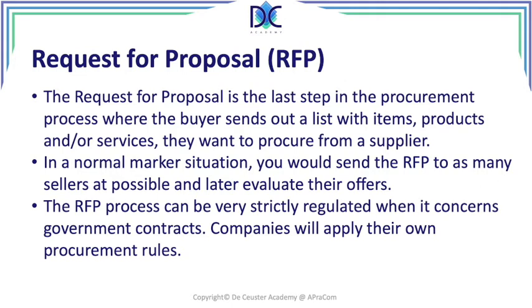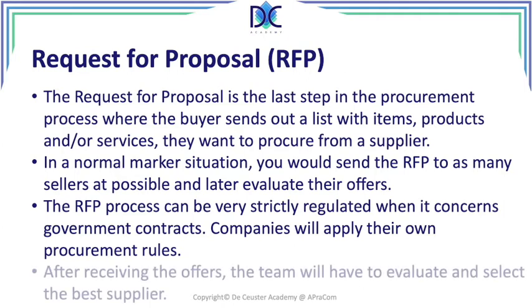And of course, we can go to what we call the approved supplier list of the company. Those are the only companies that may participate in the RFP. Once you receive the offers from the different suppliers, you will have to evaluate them and select the best supplier.